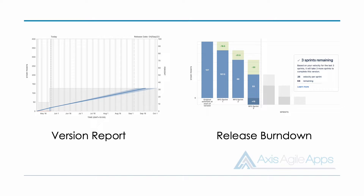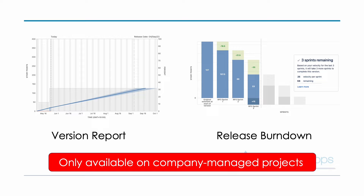Before I take you through those two reports, there is a bit of bad news. Unfortunately they are only available with company managed projects. So if you're using a team managed project, you will need to export the data and perhaps create a similar type of graph or chart manually. But by looking at these reports you'll see what sort of information to track and how you can use it to see if your team is going to deliver on time. Let's begin by taking a look at the version report.